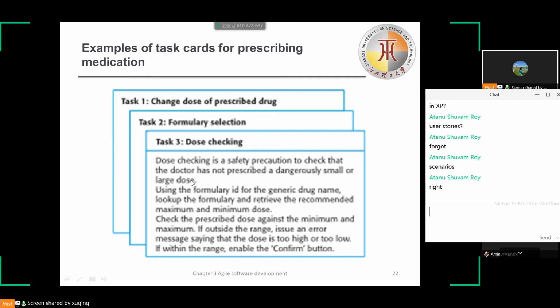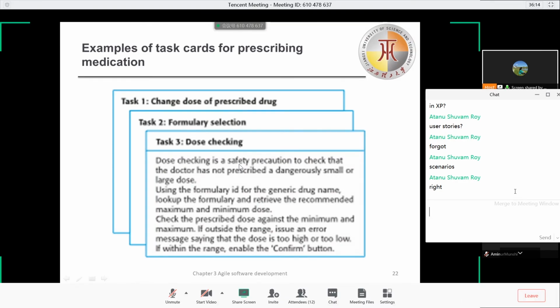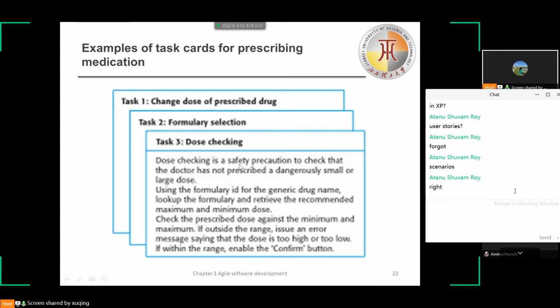Then we estimate the effort and the resources required for implementing each task. This usually involves discussions with the customer to refine the requirements. The customer then prioritizes the stories for implementation, choosing those stories that can be used immediately to deliver useful business support. So it depends on the story card we make these tasks, and then we can decide what to put in each release.